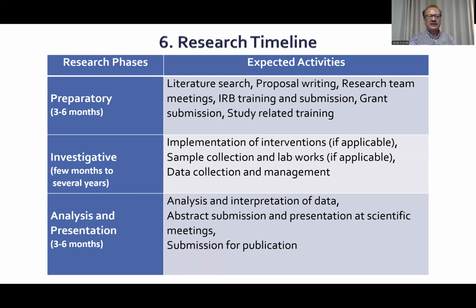So typically 3 to 6 months for the preparatory phase, and the investigative phase could last anywhere from a few months to several years, depending on the type of research and the data being collected. The analysis may take a couple of months to a few months, and presentation depends on when the scientific meeting takes place. And publication may take an additional 3 to 6 months.